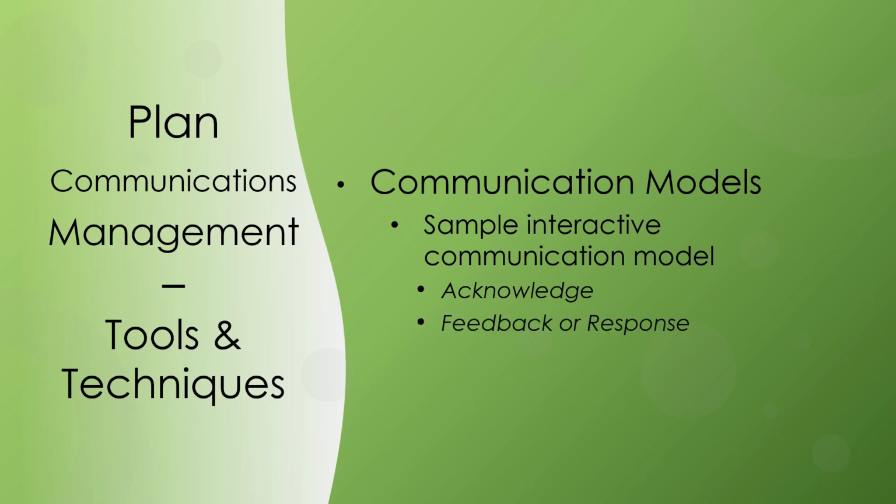Feedback or response. When the received message has been decoded and understood, the receiver encodes thoughts and ideas into a message and then transmits this message to the original sender. If the sender perceives that the feedback matches the original message, the communication has been successful. In communication between people, feedback can be achieved through active listening.